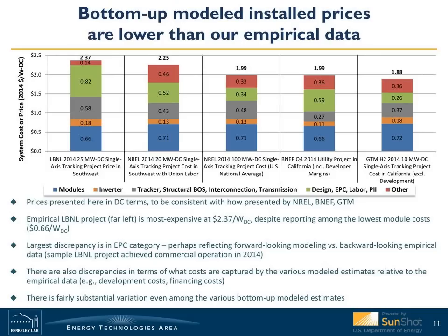In addition to the project level prices, this year for the first time in our series we were able to get some pretty detailed cost data on individual cost components with over 60 different cost categories. And we were able to construct a bottom-up model of our empirical project prices and compare that to some other models from other institutions such as the National Renewable Energy Lab, Bloomberg New Energy Finance, or Green Tech Media.